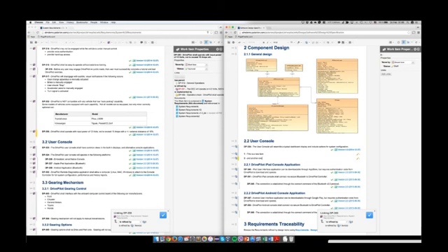We know that as the projects are getting more complex, and we speak about projects with 100 million lines of code, really big software projects, you handle very large data. And what we are promoting is the concept of not ensuring the traceability as an afterthought, but enabling your users to establish traceability as they author the data immediately. So instead of just writing my specification and then linking the initial and design requirements in the traceability matrix, ensure that when I have the system requirement and I define the software requirement, just because I'm doing it in the same system, it can be linked automatically.